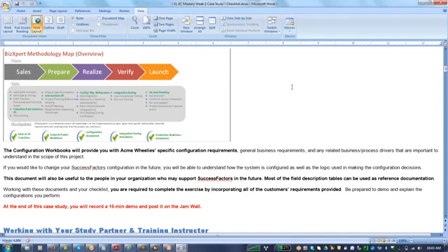So what is the typical duration of this project? It depends. If you are implementing only one module, it is done very quickly, over a period of 3 months. If it is multiple modules, then probably up to 6 months. It again depends on how soon they want to go live and on the business requirement. If they are in a hurry, it can be done in a hurry as well, and if they have flexibility, then it can stretch up to 6 months.